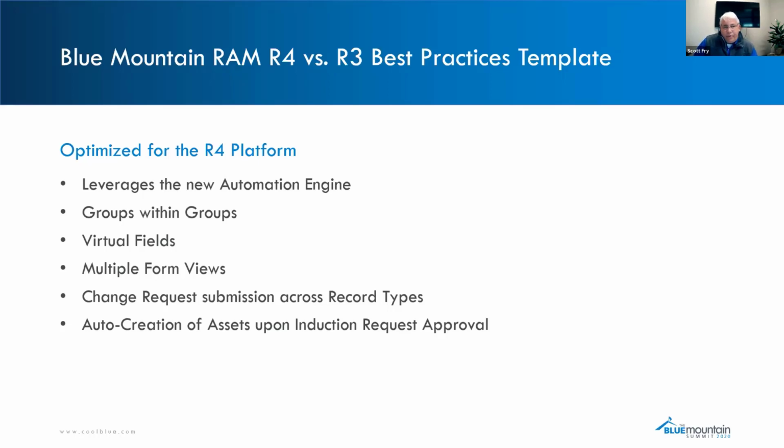Just an example of what that really means is we've added this function called end of grace period for the application. This is a read-only virtual field that is included in the planning or the full form views. What it does is it returns a calculation of work due date plus grace days as an integer value. So you can set this up to say you have this grace, but it's only 4 days after the due date. It will add the 4 days to that due date and then display that in the grace.